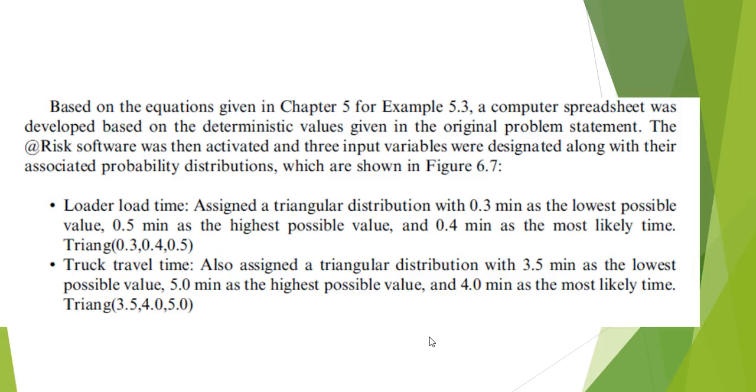But in this case, the author's gone ahead and used @RISK to do some simulation, and what they found is that for the load time, they assigned a triangular distribution with 0.3 minutes as the lowest value, 0.5 as the highest, so 0.4 is the most likely.